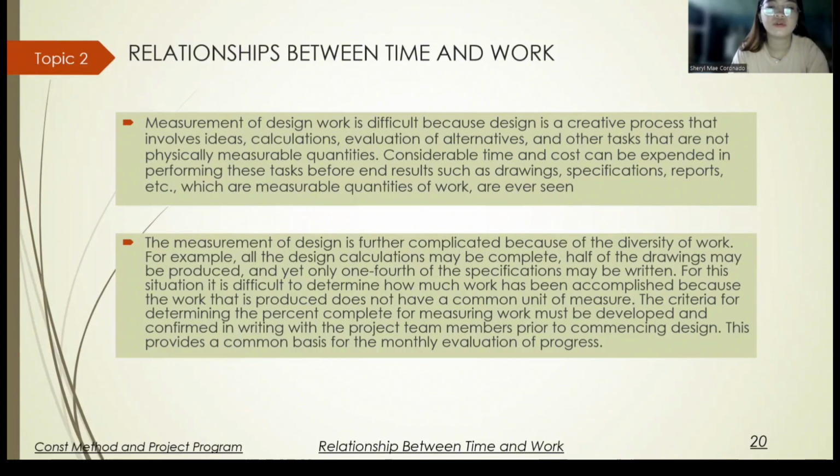The criteria for determining the percent complete for measuring work must be developed and confirmed in writing with the project team members prior to commencing design. This provides a common basis for the monthly evaluation of progress.